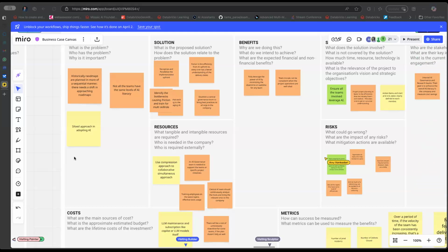Let's say team A finishes in 3 days and team B needs 8 days, but there is a gap of a few days because of which the next team cannot start. This downtime is a cost to the organization because we are not using the employee resources during that time. So that's another thing that we want to highlight.